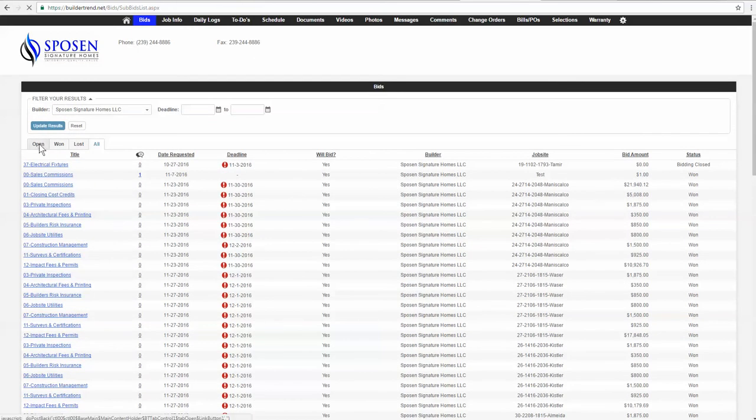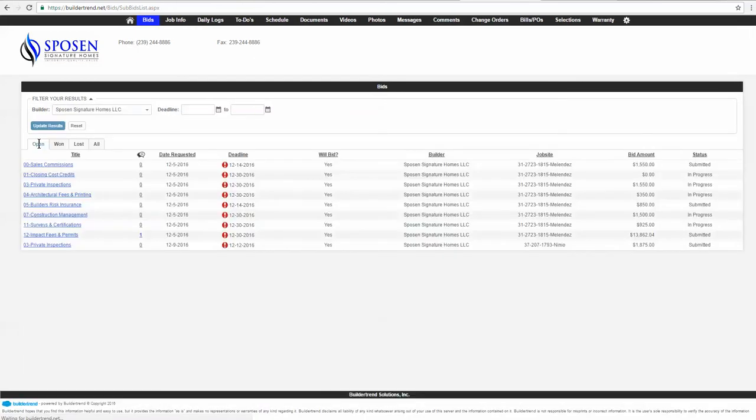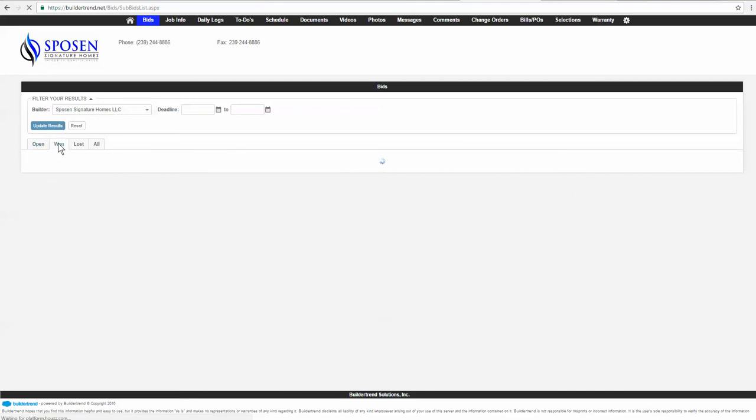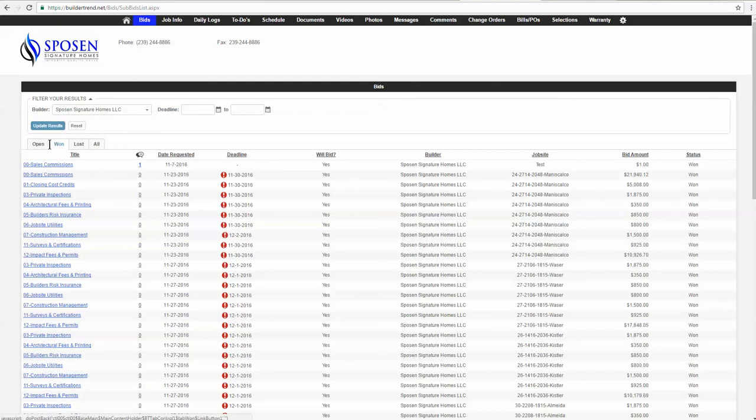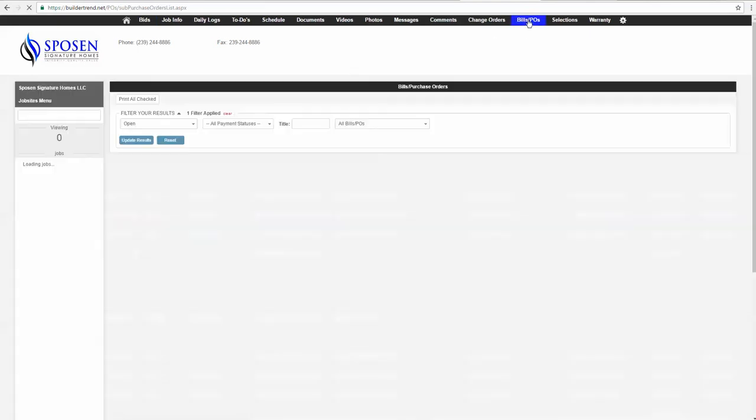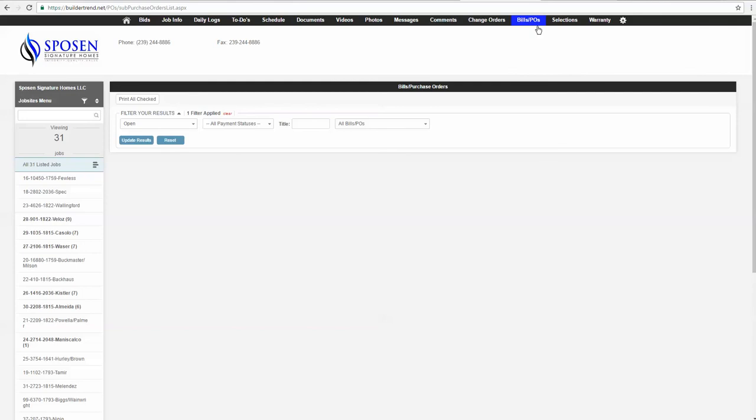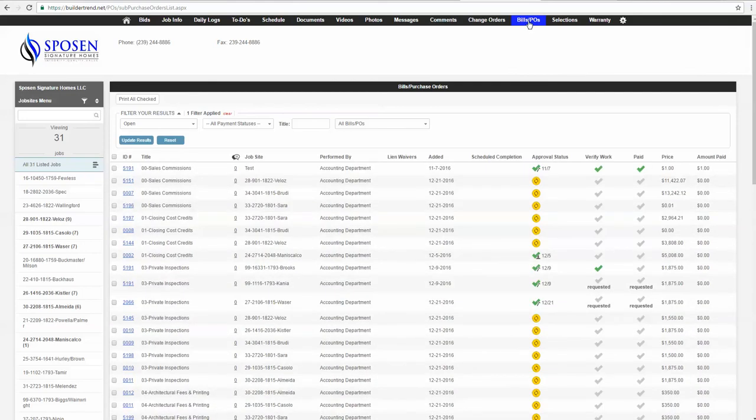So once you submit the bid, it's sitting as submitted. And then once we accept it, it will move into the won tab. And then once we assign it a purchase order, it will remove off of this won tab and actually goes into your bills and POs, which is located over here. And that's going to be our next video. So I'm going to stop this one now.